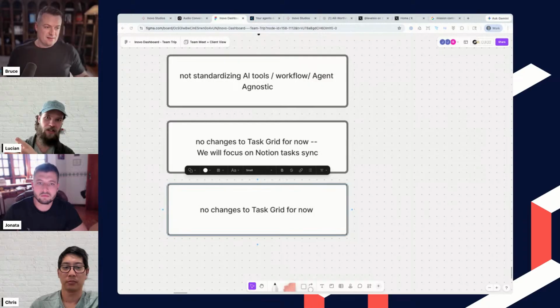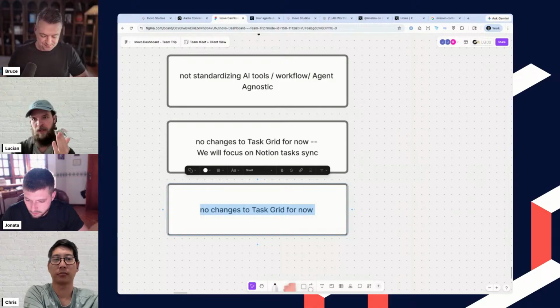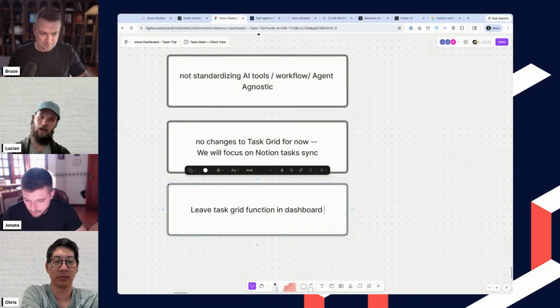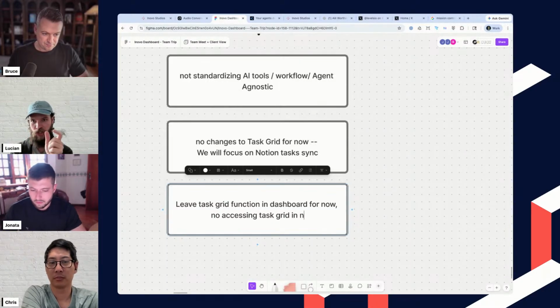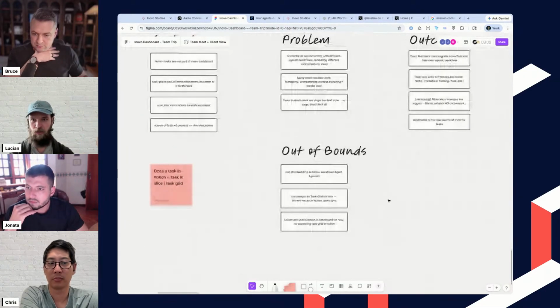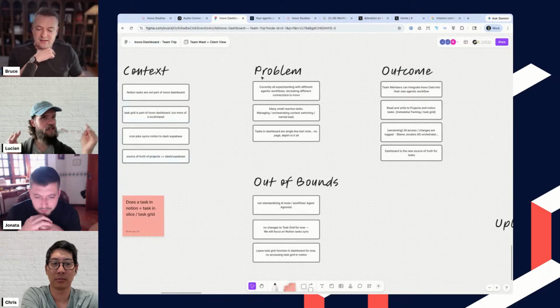So inbox is something like a client complained, and shaping is, okay, we decided that we should do something about it, so let's research what this thing even is, what the steps to reproduce are, and then move to dev ready, where the problem is clear and we can just go and fix it. And that lends itself well to an automation thing. We can just move it to shaping. An agent picks it up, does the investigation, moves it to dev ready. Yeah, I think that's tight enough.